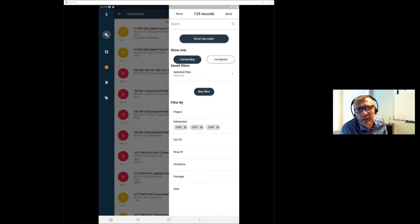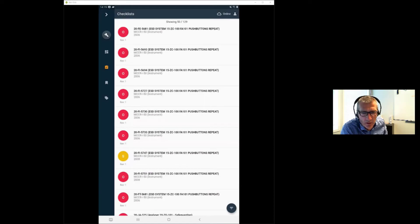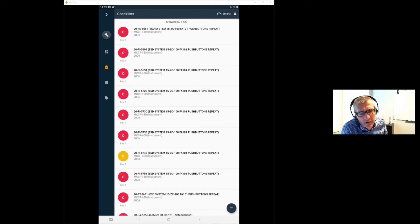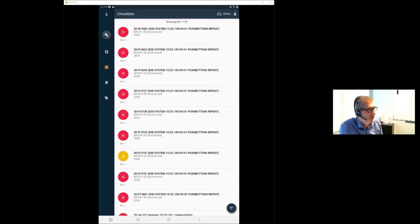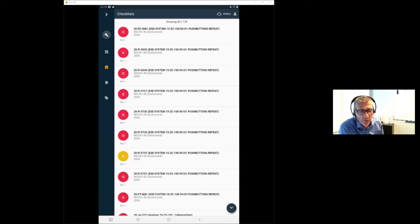The 129 filtered checklists are now showing. The red ones with an 'O' in the middle are outstanding — not started yet. The orange ones with an 'S' are in a signature process, because checklists can have up to five signature groups with multiple parties verifying completion. If you click on a checklist, for example the '20 FIA' for 5747, it opens that checklist.